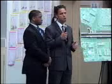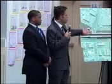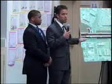Caltrain wants to go electric and kind of piggyback on some of the high-speed rail money, and I think that's great. Is this project already allowed for electrification? You just hang the wires above? Yes, it does. We will not build the poles as part of this project. We will, however, build the foundations that those poles will need, and we will cast them. You won't see them, but they'll be hidden in the structure.